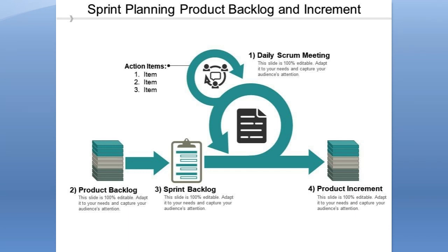Then once the second sprint is completed, the user can see the product catalog. So the next product increment will contain the login and also the visibility of the product catalog as well. So each increment provides an opportunity to gather feedback and make improvements in the product, ensuring that the product evolves based on user needs and changing requirements.